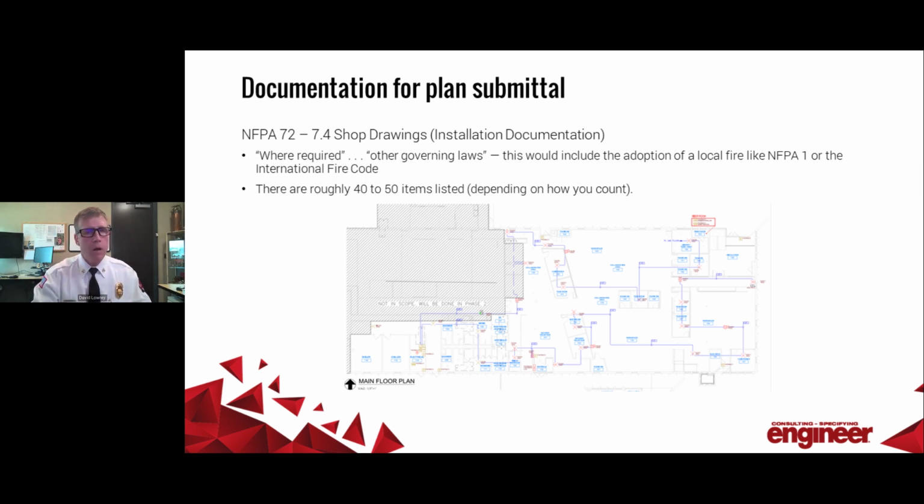And then the last part, are shop drawings required, right? And once again, it goes down to where required. So it's not essentially mandated on this, but yes, I'm going to require you to submit shop drawings. Most jurisdictions are going to require some type of shop drawings if they're going to be issuing a permit, right?